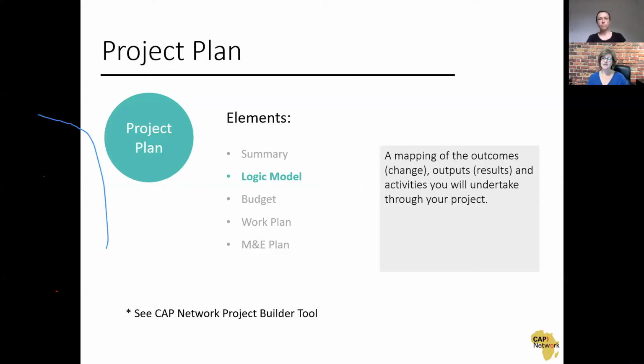It's that we are going to eliminate waterborne illness in children in village X. Or, for example, in the Rainmaker, we are going to support expanded agriculture through irrigation in community X. So the point is that you're talking about creating change in people's lives as opposed to completing an activity in your project. So a logic model forces you to connect what it is you're going to do with the change and the vision of what will be different if you do those things.